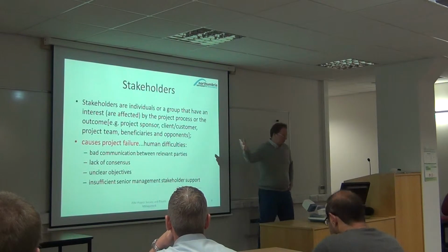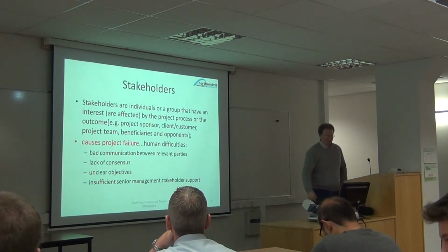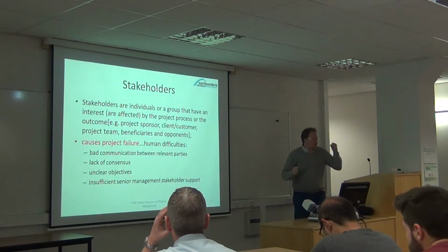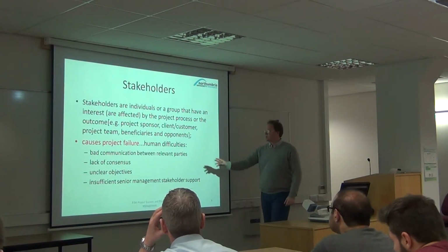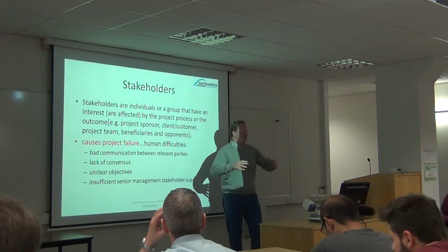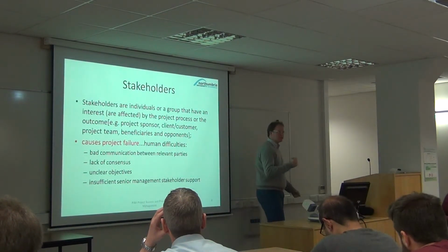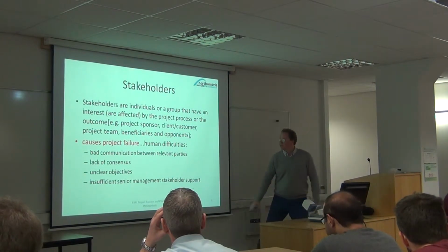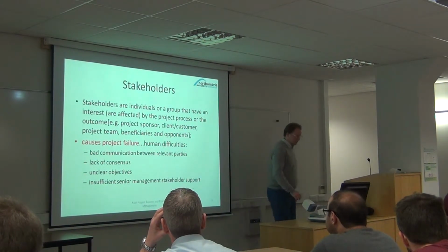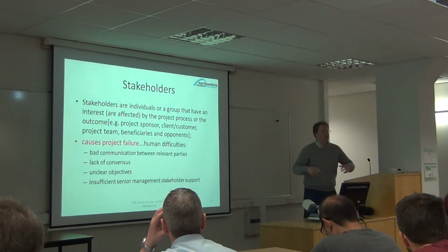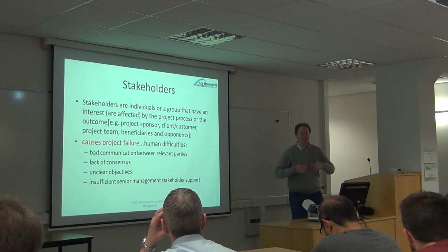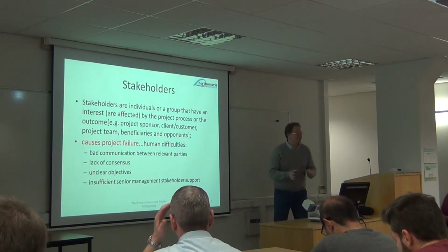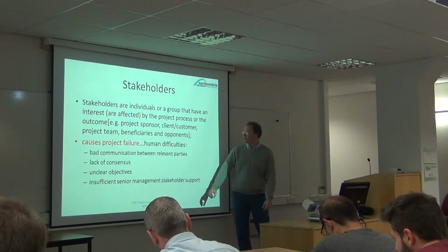Here, just to name a few, it may be the project sponsor, the person that is championing, we should really do this project. Sometimes the sponsor is also the financial person, jumping in, the budget holder, something like that. This depends a little bit on where you are. In the UK, we favor the sponsor as being the one that oversees and is responsible for it and champions it. So this is quite interesting. When I say UK, this is the old PRINCE2 methodology.